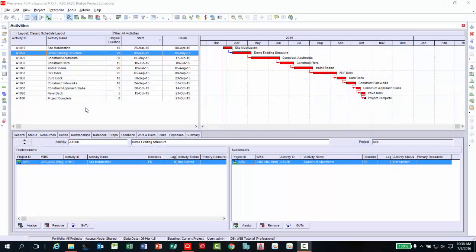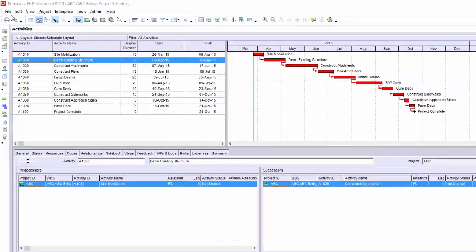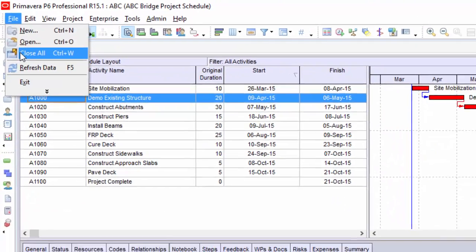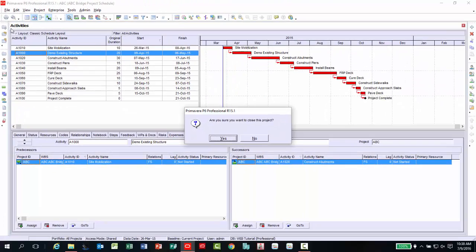The first step is to create the baseline schedule. The quickest way to accomplish this task is first ensure there are no projects open by going under the file menu and selecting close all. Confirm you want to close the project.